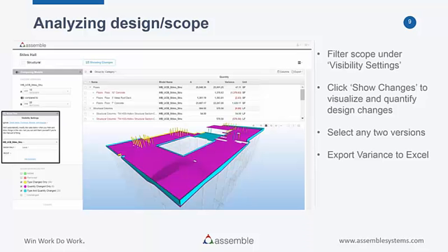That's exactly right. We see it here at Webcor, since we provide professional construction pre-construction services, that this is the homework that we have to do before we even distribute documents out to the subs, and definitely before we receive the bids, updated bids and budgets back from them. Ultimately, once new design gets issued, it's our job really to analyze the changes, understand them, communicate that to the rest of the team, and make sure that we can stand behind the information that we're sending back to the client. Ultimately, the data that we are capturing needs to be actionable and needs to be informative.